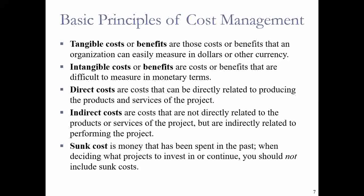Indirect costs are incurred as you do other activities alongside the project — as you carry out activities toward the project, you also incur other costs. There is also sunk cost, which is money that has been spent in the past. When dealing with a project, you should not include sunk costs. Don't incur them since they are done already. If you do include them, you might produce an unrealistic project cost plan.